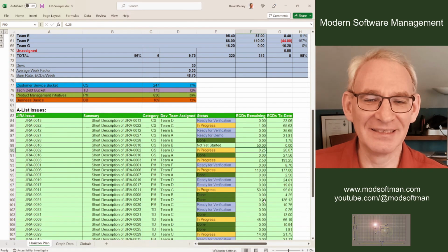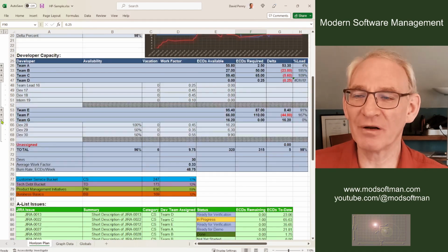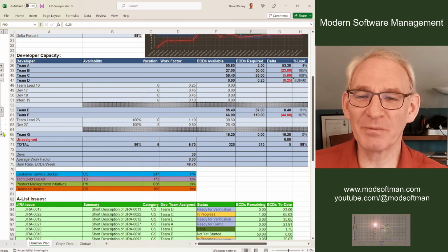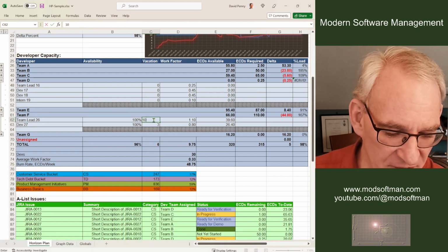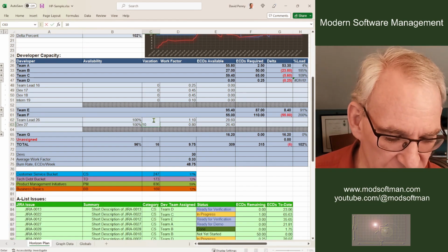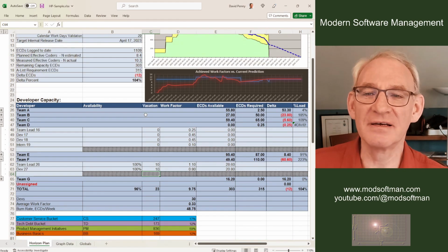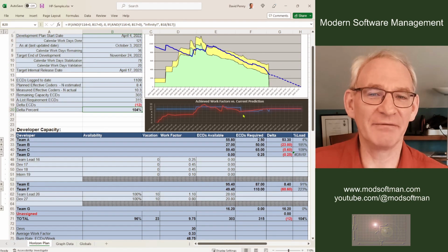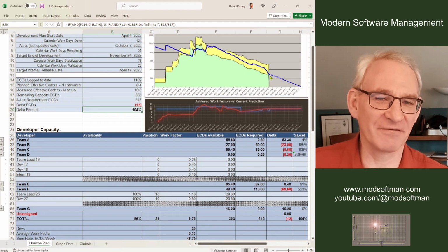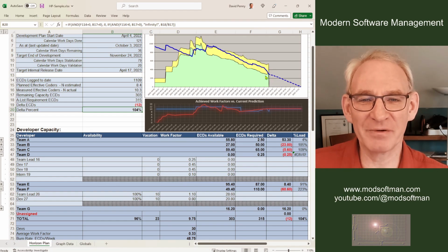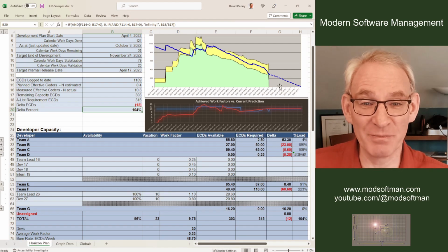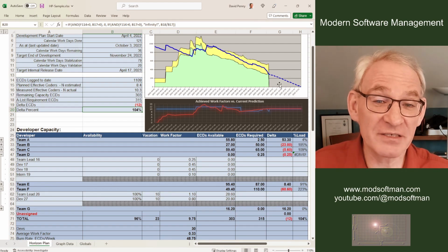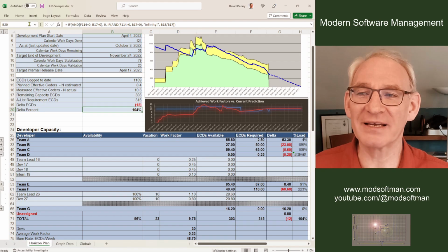So that's not good. And again, say if we did someone on Team F, say, one of these two people, they're burning out. They can't do that. They need 2 weeks of vacation. Both of these guys, please take 2 weeks of vacation. We don't want you guys burning out. And now we're done. We're minus 12. And we can see here that those lines just converged very dramatically based on what happened. We took a little bump up here with the re-estimates, took a big bump down by losing a team, or if a dev quits, for instance, or by giving those people extra vacation.